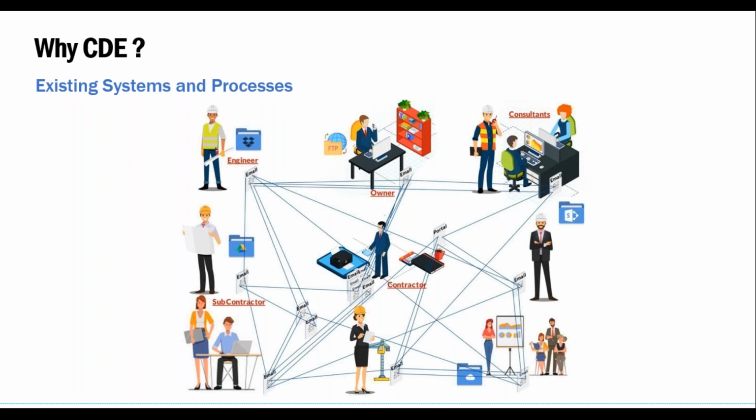So it is not only about exchanging this information between these organizations, we also have to follow a project quality plan which defines who originates it, who reviews it, to whom it has to go for information, and any comments coming from any of them need to be incorporated inside these designs, and eventually it has to be sent back, and eventually the design has to be released for construction or released for procurement, and based on that